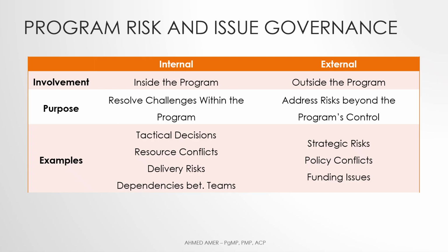The organization may set limits on how much risk is allowed in the program. These limits are called risk thresholds, and everyone working on the program is expected to follow them. The limits depend on how much risk the organization is willing to accept, known as the organization's risk appetite, and in coordination with the organization's governance and program management teams.